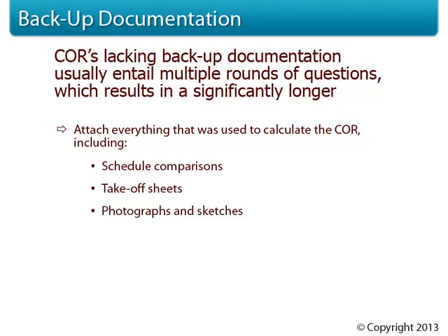Photographs are a huge benefit, and I don't just mean for documentation purposes. The huge benefit that I want to point out here is that a photo essentially takes the reviewers and approver out into the field and shows them the issue in question. Good photos save them the hassle of having to take a site walk to review your change order request. If we have to wait for them to do a site walk before giving approval for a request, it's going to delay payment. And it's worth noting that GCs, CMs, and owners all do job walks pretty regularly, but none of them are likely to do a job walk for the sole reason of verifying your individual change order request.